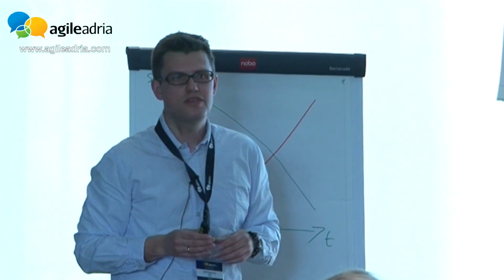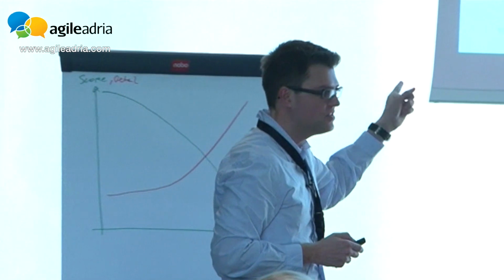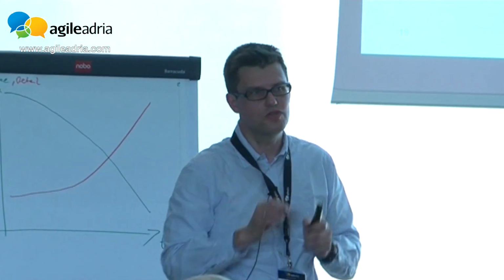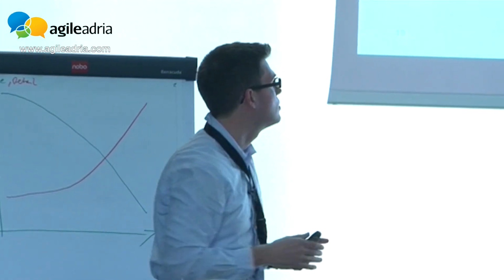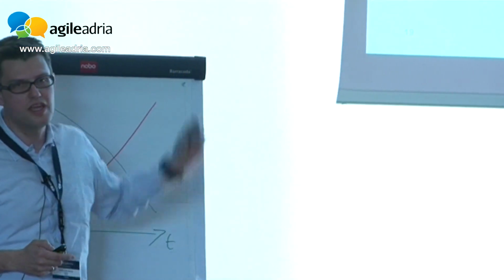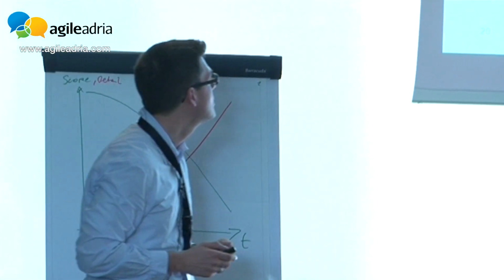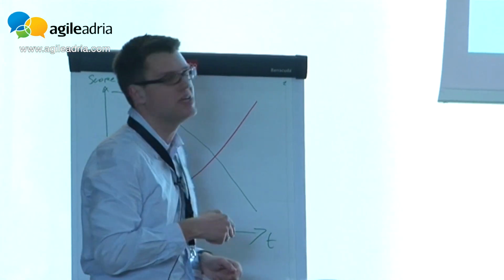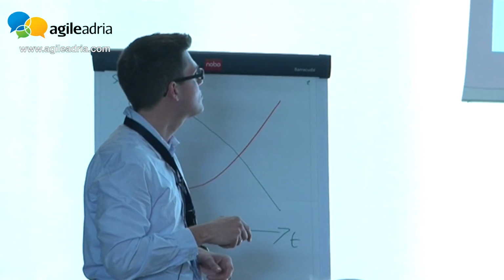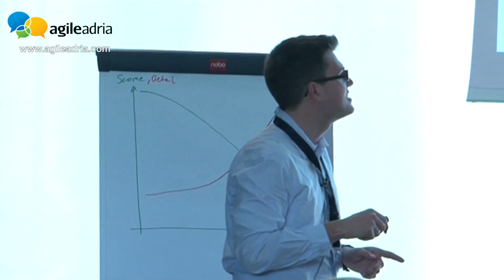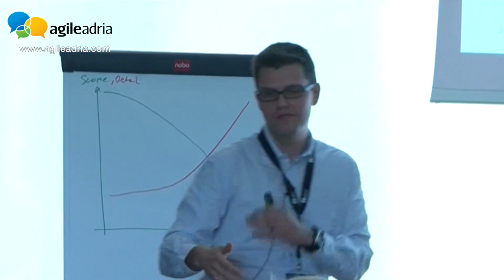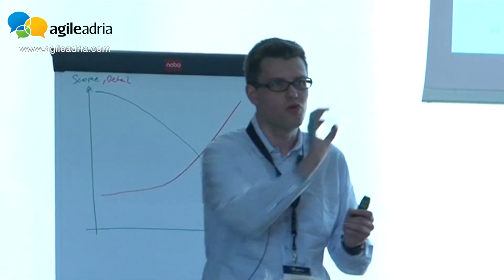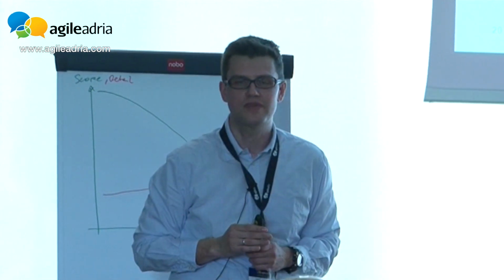Then you think about how important are these features in order to make the minimum walk through this scenario in order to achieve the goal. So you can order them by necessity. So you can say, well, in order to get from here to here, I have to at least be able to somehow select a book. I have to somehow enter my address, and somehow probably I have to get some delivery slip where somebody can pack my order. So that's the minimum I need in order to actually get this workflow done.